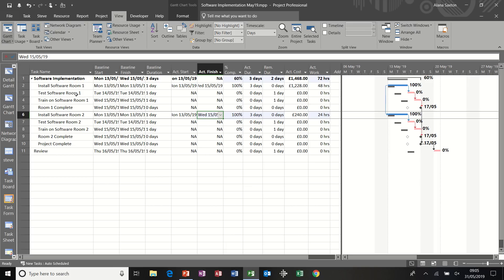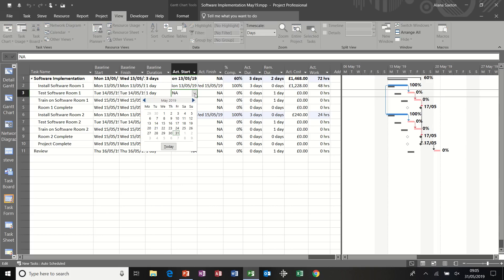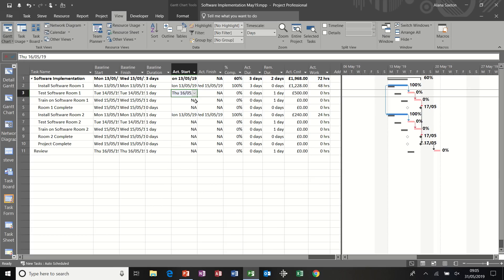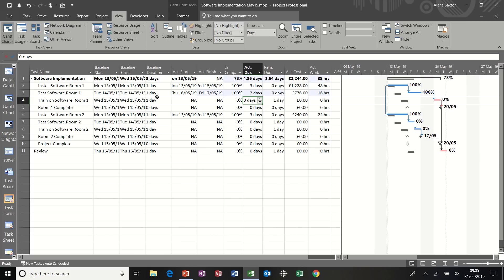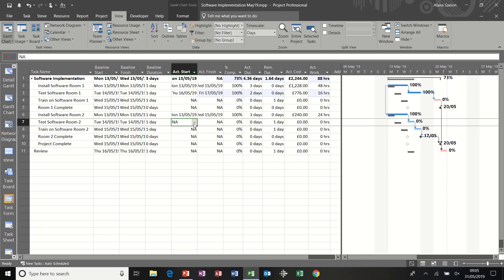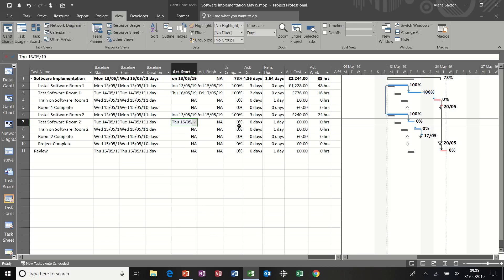Another way, say test software room two. Let's say that was due to start on the 15th, but obviously it's following on. It is now following on from the 15th. So it can't have started on the 14th. So if I say it started on the 16th and instead of filling in the finish date, I just go to actual duration. So it was two days instead of the planned one day. You can see that moving along and I'll do the same for this one. So its actual start was the 16th and it was two days in duration.